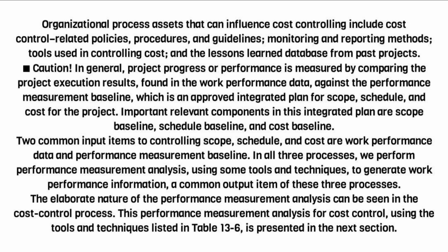Two common input items to controlling scope, schedule, and cost are work performance data and performance measurement baseline. In all three processes, we perform performance measurement analysis, using some tools and techniques, to generate work performance information, a common output item of these three processes.